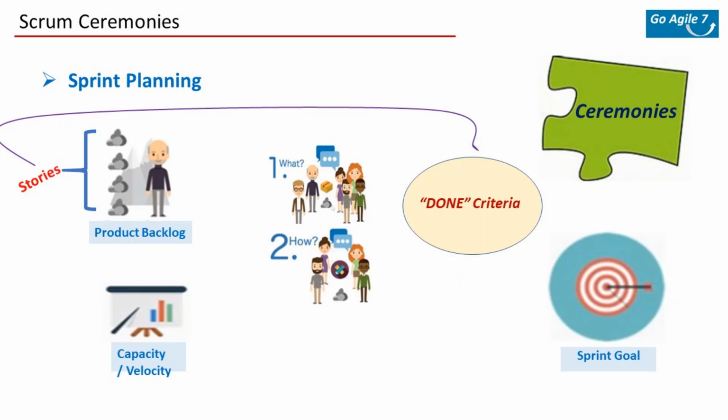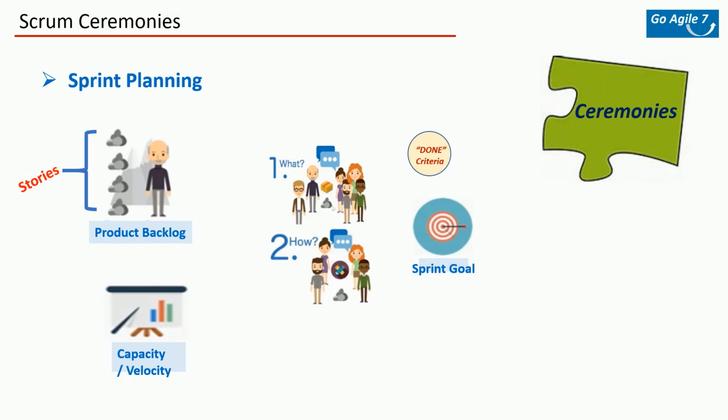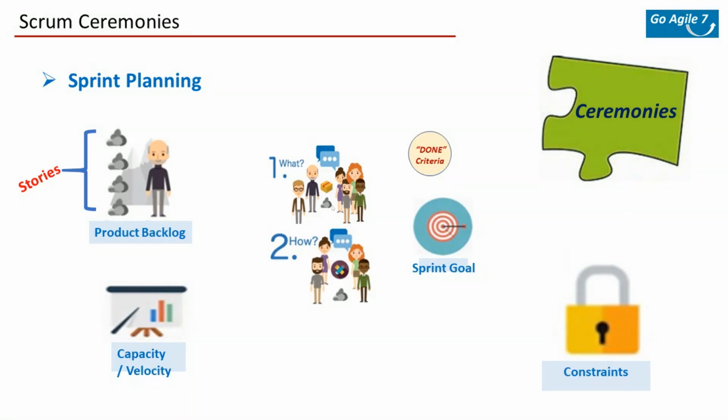Then address concerns. Open the floor up to your team to discuss any roadblocks, issues, or potential scheduling issues that might affect the delivery of any backlog items. So, to a large extent, this is what you do in a typical sprint planning meeting. Sprint planning meetings are slightly longer. They can go from 2 to 4 hours for each sprint. But during the sprint planning, the team should also be able to break down each story into tasks. And we'll cover that in detail maybe later.